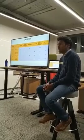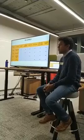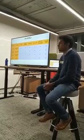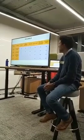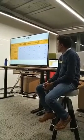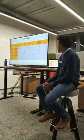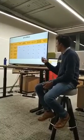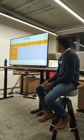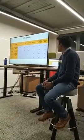You have level 1 with uncertainties on the problem. If you think an epic is something really blurry when it comes to problem space and you need a strong understanding of your problem, then possibly you need to start with the UX level 1 set of activities in your Scrum process, in your sprint. For that, you need to execute all these UX Burner activities in your sprint: Burner Canvas, scoping the MVP, starting from the problem, doing ideation through a design workshop, prototyping the concept, pairing and sharing during the development, and also for the stories that you want to test.